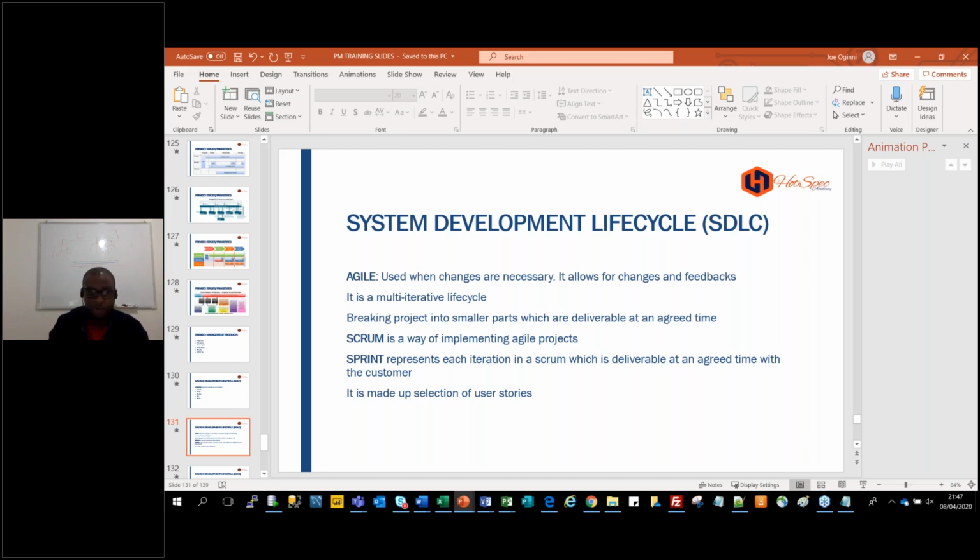Don't forget one of the principles of Prince 2, continual business justification. It means at every stage of the project, review the necessity for carrying out that project. They've done stage one. Does anything impact the project? I'll tell you what, yesterday's session of BA will tell you that you must start a project, but there's a political policy coming up. Now, another political party is going to win. Their manifesto has already told you something is going to change. Does that affect your project?